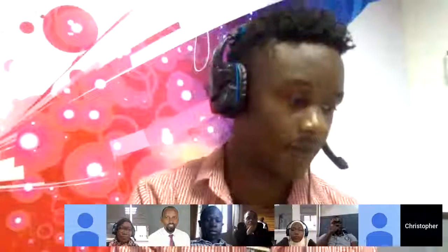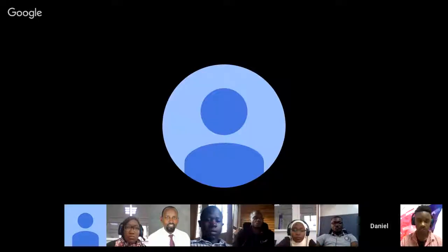Okay. But what we came up with as a team was, in case there is a task that would block all the rest of the team members, we created a ticket for fixtures, where team members would identify fixes and possible bugs, and we could create tickets that would keep them occupied until the person working on a priority task is done, and then the next person can move forward.